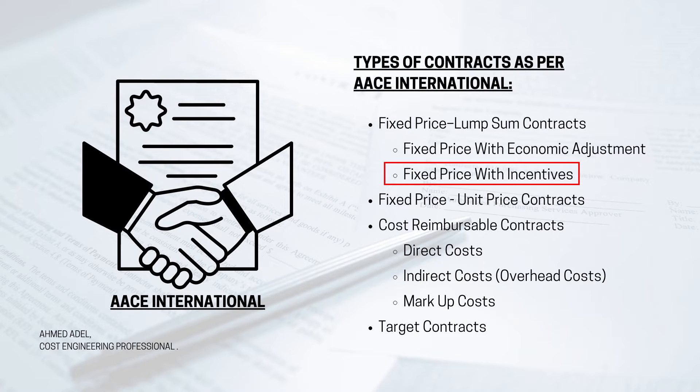The second variation is fixed price with incentives. It's still a lump sum contract — say 40 million for a building — but conditions are added: for example, if the contractor finishes the project two months early, there will be an incentive of five percent extra. This gives motivation to the contractor. The incentive is conditional and linked to a performance target like early completion.